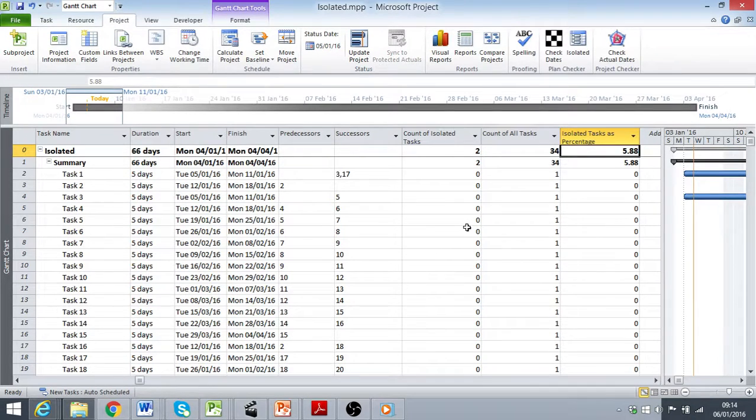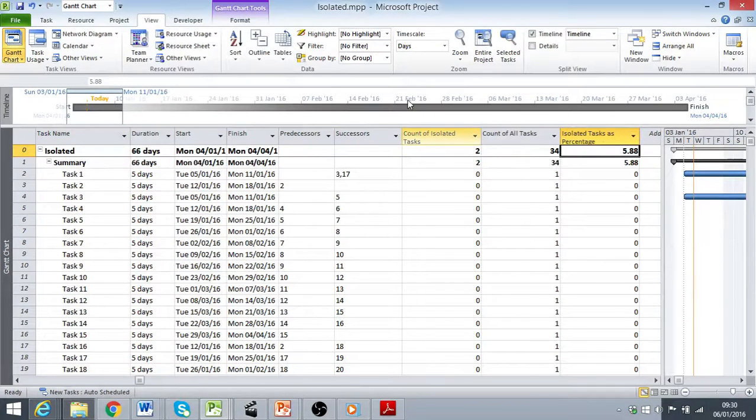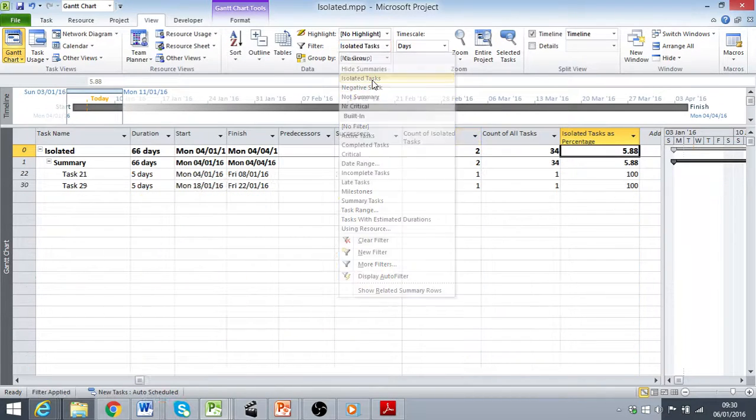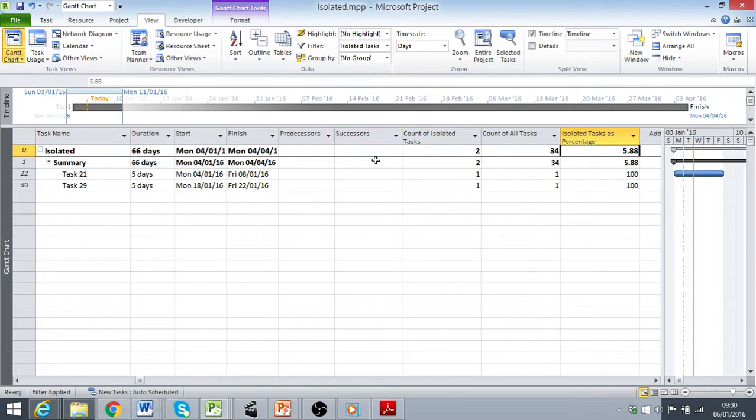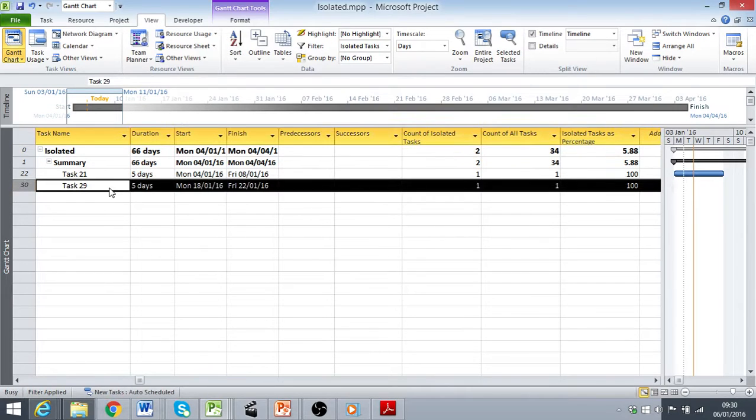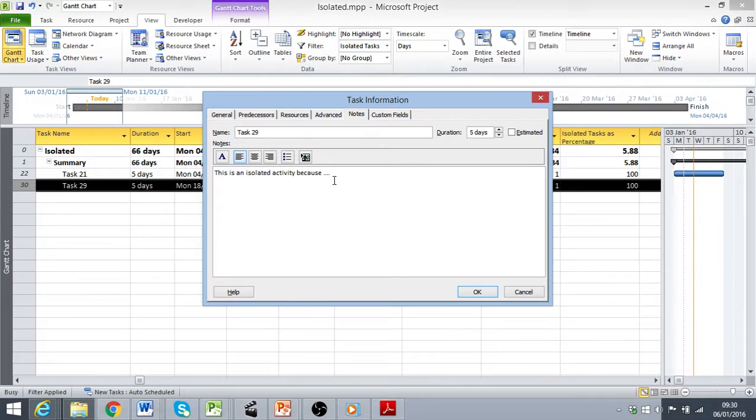So this is quite a low number and would probably pass muster at any surveillance or audit event, providing, of course, I could justify why the tasks that are isolated do not require predecessors and successors in the context of the schedule.